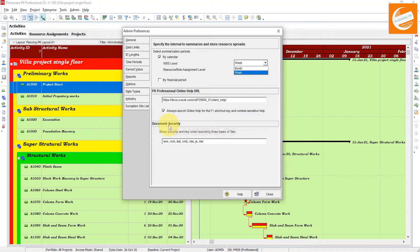The second tip is: after you choose to summarize data by financial period, you must summarize the closed projects at least once to store project data in the financial period intervals. Doing so ensures that data will display accurately in profiles and spreadsheets when users choose to display data for all projects in financial period timescale intervals.